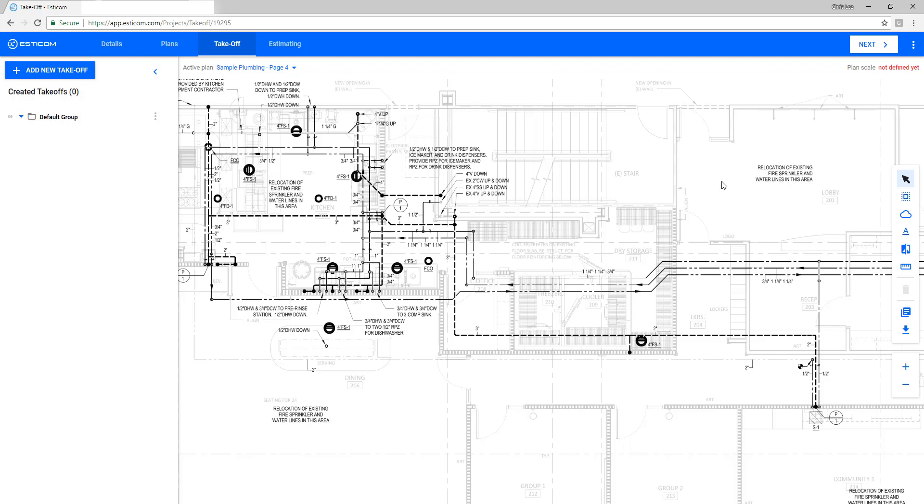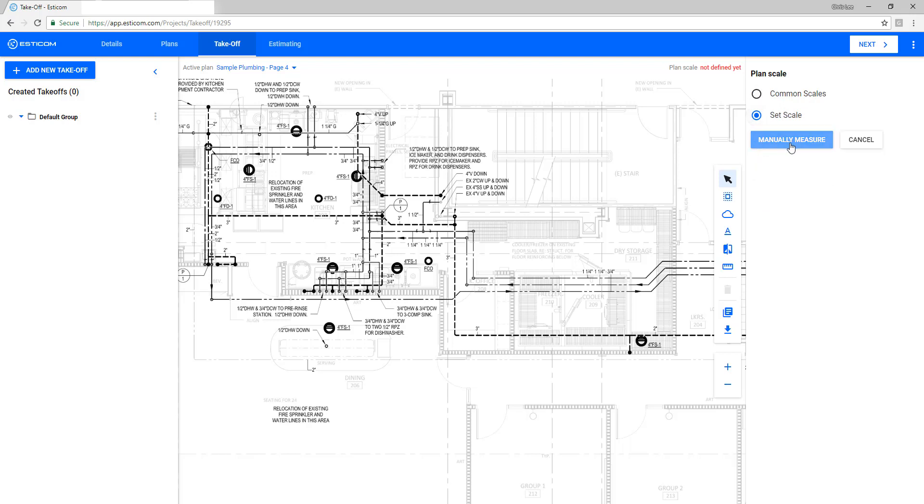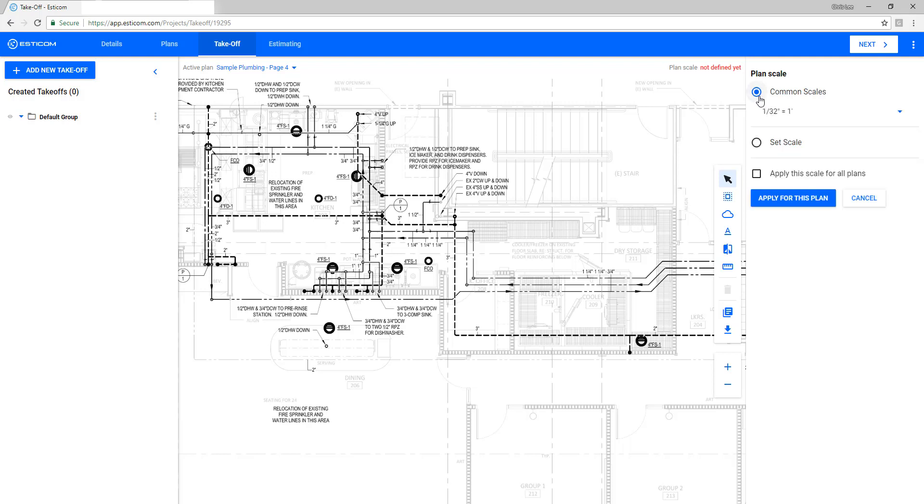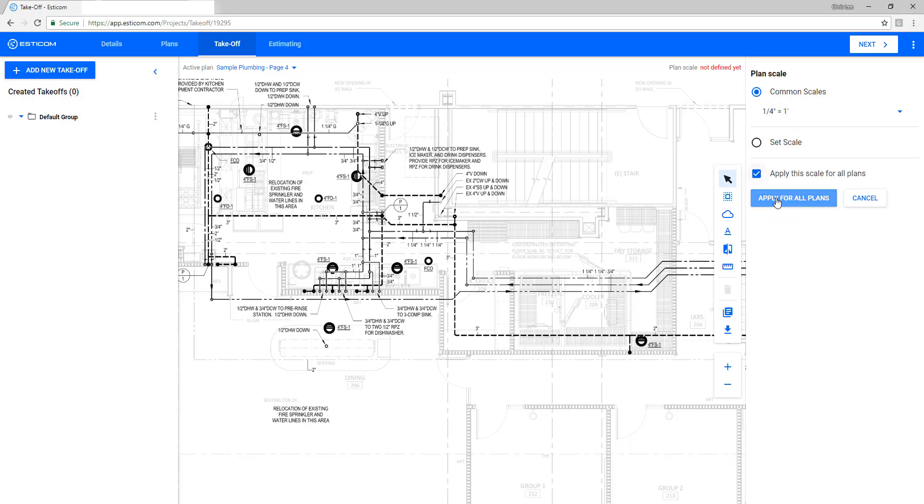To ensure accurate measurements, we'll first need to set our drawing scale. You can use our common scales if the scale is depicted on the drawing, or you can manually calibrate the drawing using a known distance, such as a doorway. It's always a best practice to use a longer distance for improved accuracy, and make sure you double-check the depicted plan scale to ensure it is listed correctly.